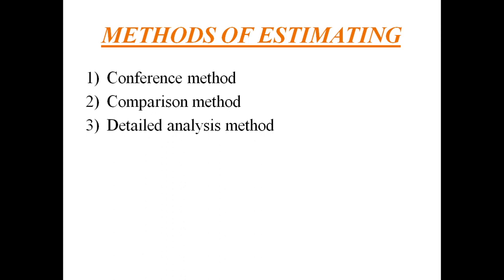Another comparison method is the application of rate per unit of measured factor. The unit rate may be hours per kg, rupees per meter cube, etc. Many variables can make this procedure dangerous to the uninformed estimator.